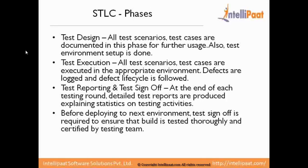Next comes the test design phase, where the test plan is brought into action. The testing team documents all the test scenarios and test cases covering all the business requirements, client requirements, and design activities. Once these test cases and test scenarios are documented, reviewed, and finalized, the test execution phase begins. In test execution all the documented test cases and scenarios are executed, and any anomalies, defects, or issues observed are logged following a defect life cycle, which is documented in the test plan.